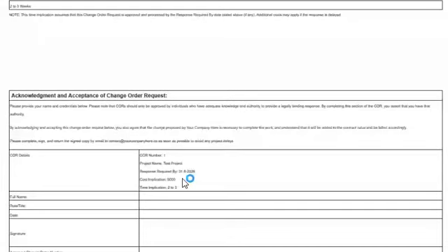As soon as you find out that there's something changing on a job site, don't wait for someone to give you a change order for it. Send the change order request so you start the paper trail.